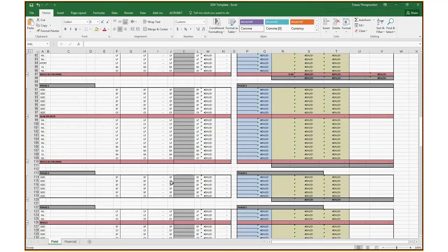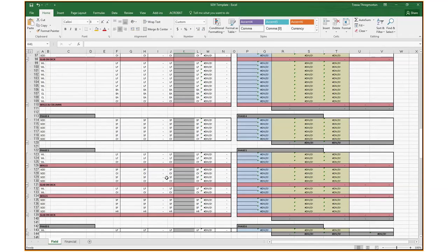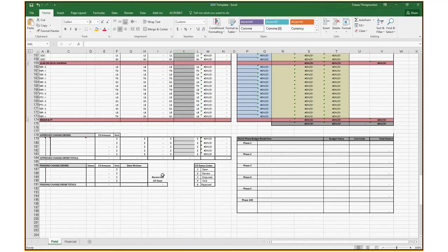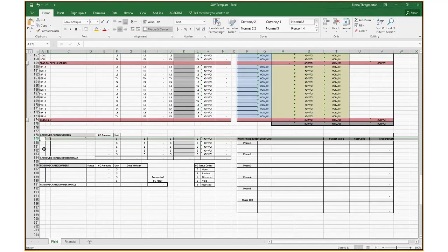In addition to the standard work of the base contract, there are also going to be change orders on the project. So all change orders will be updated here prior to billing. If they're not there, that notification will need to be sent to the accounts receivable as well. Often it takes a while for change orders to get approved, and so it's understandable that sometimes they'll get approved the same day that billing needs to happen.